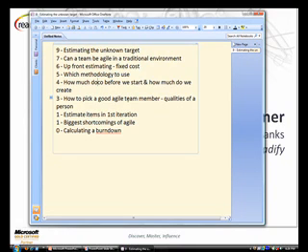If you've never done an agile project before, the first thing you do in terms of estimating your unknown targets is take a spike. You've got to take an initial cut at what's involved. So let's say we've got a project where we might have something out here and it starts getting really nebulous in terms of the end requirement. But you have a decent idea of what's going to need to be done in that first hit. If you take that and do, say, a week on it and try and nut out what's involved and get a feel for how long things will take, you can then apply it to all the requirements that the customer's dreamed up.